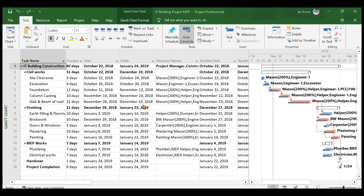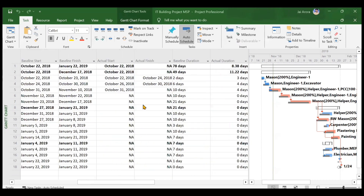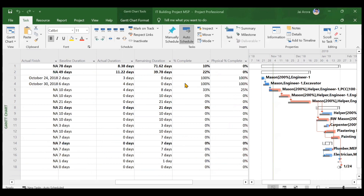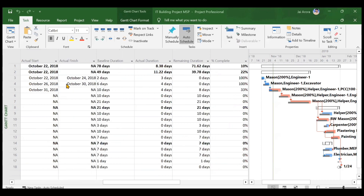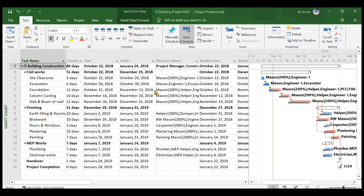In the previous video we already updated the status of our project in Microsoft Project. The first two activities were 100% complete with actual start and actual finish dates recorded. The baseline duration for the first activity was two days but actual duration was three days. For the second activity, baseline was six days but actual was four days. The third activity was in progress — four days passed, eight days remaining, against a 10-day baseline, to complete in 12 days total.